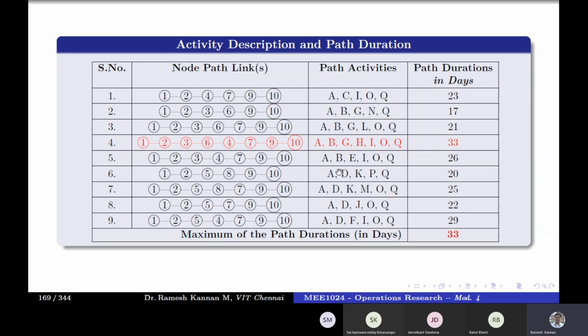So if you are given a task to finish from start to end, the longest path will be the critical path, made up of activities of that critical nature. Not only that, it will not have any buffer time. So if you happen to delay those critical activities, then your project duration gets extended, and that is not what we want. That is why people call the critical path very important.